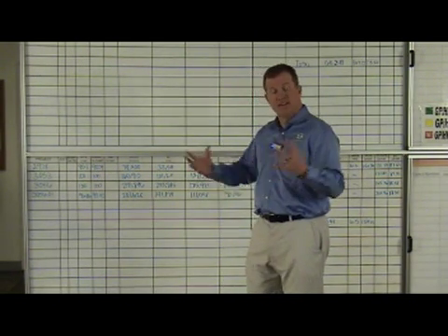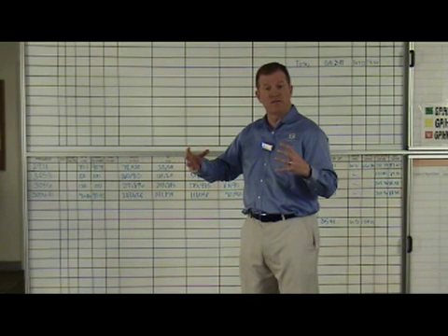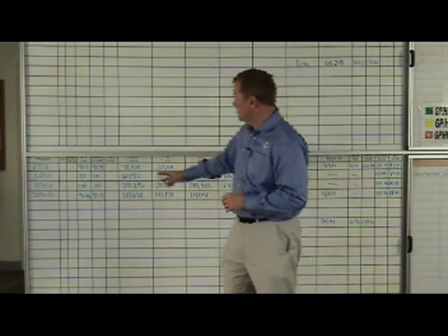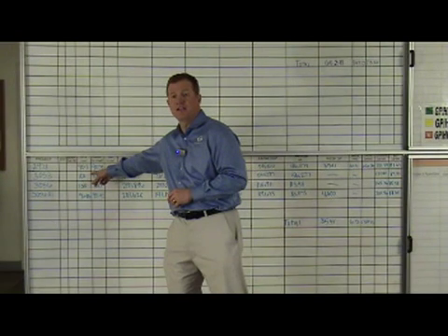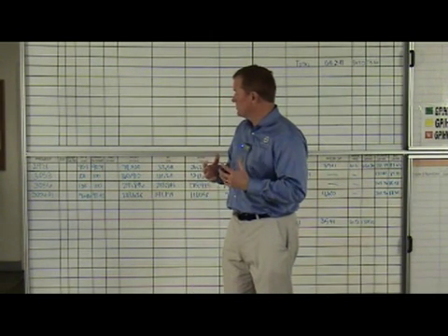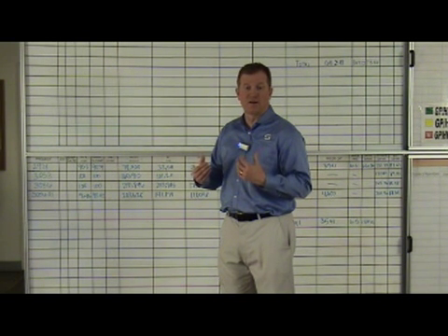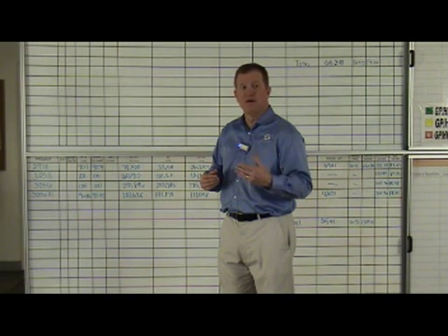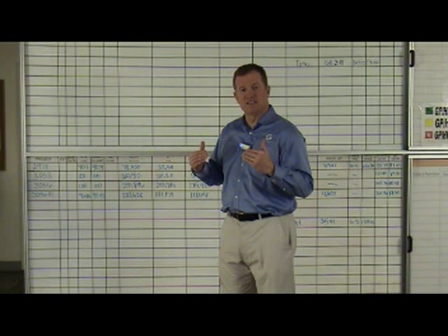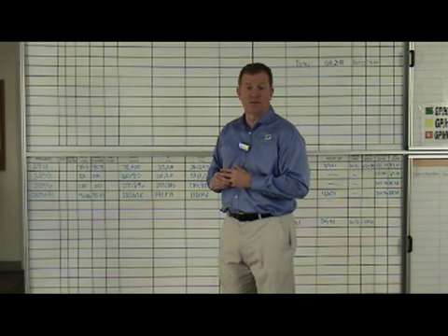Now one of the things that can happen with Bob is sometimes Bob wants to be very careful. Since we present these numbers company-wide every Monday at 1 o'clock, sometimes he's very careful about what percent complete he counts here because he wants to make sure that he can protect the job. And so sometimes we get what we like to call sandbagging. He pads the job up or is careful to keep the percentage achieved low so that at the end of the job, if there's any problems, he can take credit for that later.